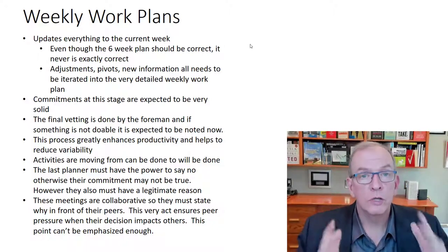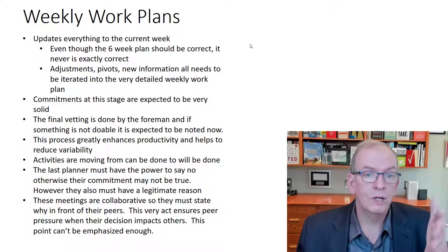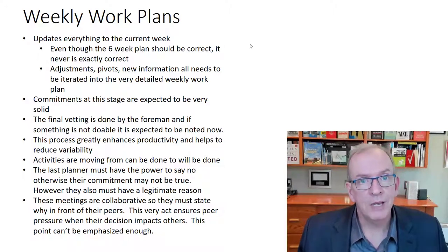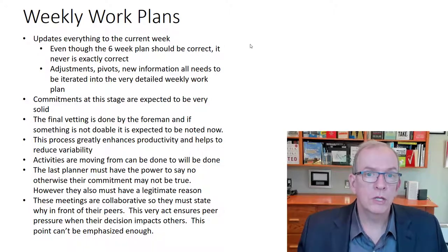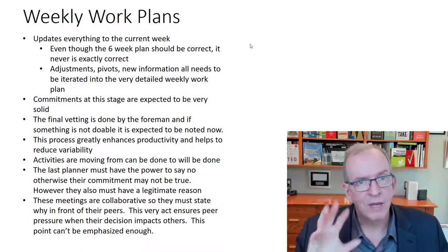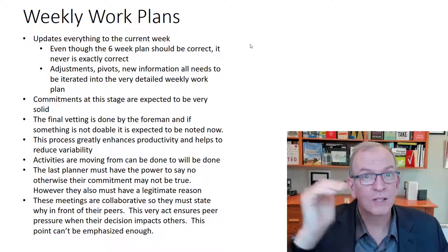Research shows, using the traditional methodology, when they track planned percent complete, what did we say we were going to do and what we actually did, it runs at around 54%. So Lean, we try to strive for 100%. We usually, if we can get it between that 85 and 90%, that's great. If we get to 100%, then we have to question ourselves, are we making it too easy? Are we making the goals not as much of a stretch?